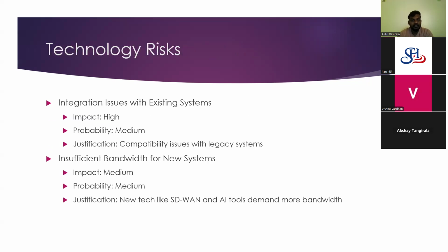Coming to technological risk, first let's explore the technology related risks. One of the biggest challenges is integration of new systems with the existing legacy infrastructures. If new components are incompatible, it can lead to major disruptions. Another issue is insufficient bandwidth, especially with the introduction of intensive tools like SD-WAN or AI powered systems. Both risks have medium probability, but their impact can be high if not addressed proactively.